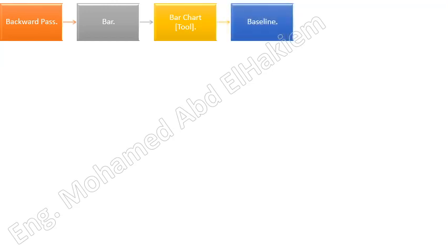Baseline. The approved time-phased plan, for a project, a work breakdown structure component, a work package, or a schedule activity, plus or minus approved project scope, cost, schedule, and technical changes. Generally refers to the current baseline, but may refer to the original or some other baseline. Usually used with a modifier, for example, cost baseline, schedule baseline, performance measurement baseline, technical baseline. See also performance measurement baseline. Baseline date. The date on which the current baseline was established.